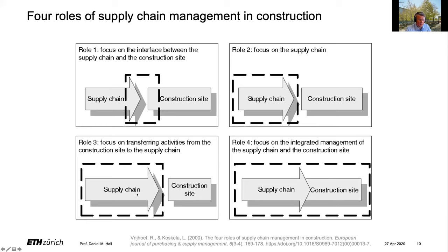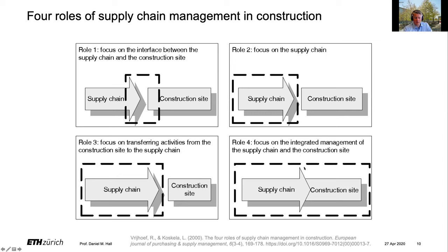Third is about the transfer of activities from the construction site to the supply chain. This is a large part of what we talked about with industrialization of construction — especially with offsite — the idea that you take activities from the construction site and move them into the supply chain. So the prefabrication of a wall element: the construction site box is a little bit smaller, the supply chain is a little bit bigger. You're moving activities into the supply chain through more prefabrication and pre-processing. The fourth role is the focus on integrated management of the supply chain and the construction site holistically.